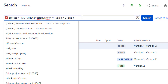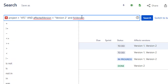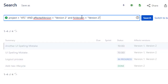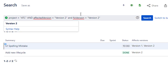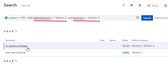If you want to search on both affected version and fixed version, you can use the AND clause and add in the fixed version. In this case, we've got two issues that were discovered to affect version two and were also fixed in version two.